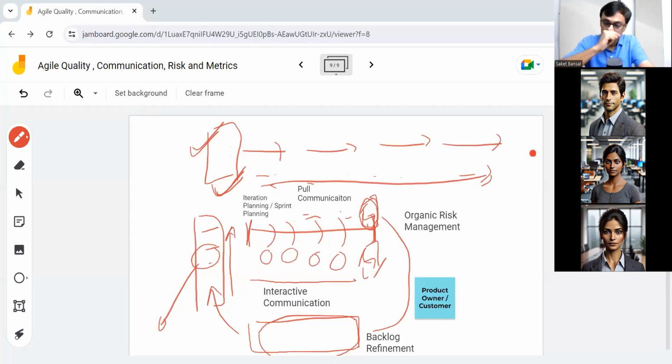So you just mentioned technical risk. Does the input of this technical risk go to the product refinement sessions? It should go, yes. From an agile perspective, if the scope of this risk is limited to the current iteration, then your iteration planning is the focus area. Say you have a failure which can impact the sprint goal. You need to discuss it in sprint planning, and you need to discuss it every day during the daily stand-up.